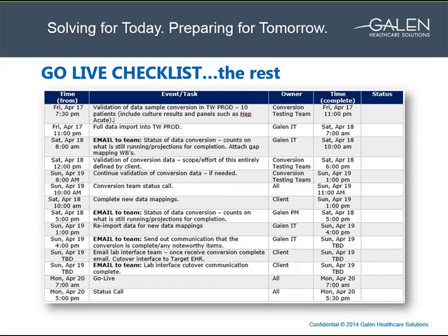I also want to point out that, as far as communication goes, there are typically begin and end day status emails. That's very helpful so people know if you've got some testers on standby, for example, when can they come in, what's left to be done, is it going to take the entire time period, 2 or 3 days, or is it going along better, or is there a delay of any kind?